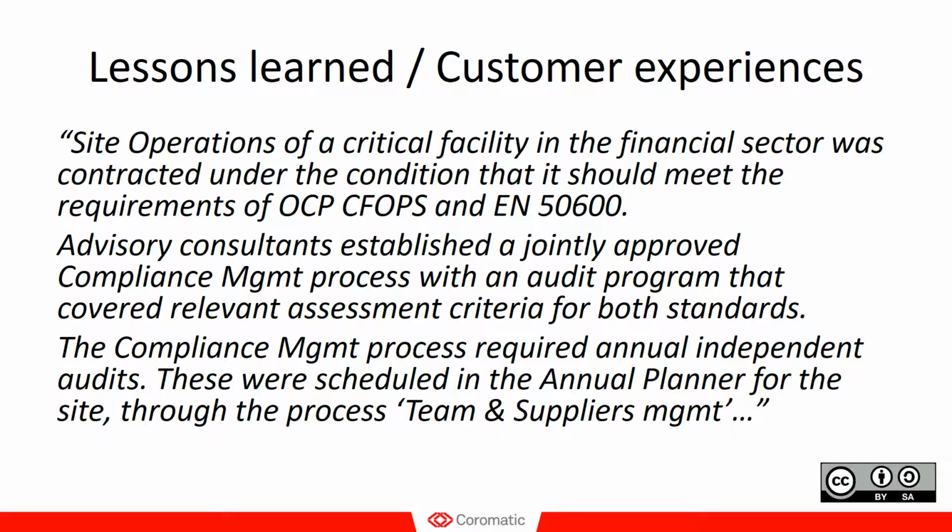In this case, it's the site operations of a critical facility in the financial sector, and it was contracted under condition that it should meet the requirements of OCP CFOPS and also the European norm 50600. But at the time of the contract, the specification for how that fulfillment should be done wasn't really clarified. So that was part of the statement of work to sort that out. And advisory consultants, they were used to establish a jointly approved compliance management process where an audit program was defined, which covered the relevant assessment criteria for both standards.